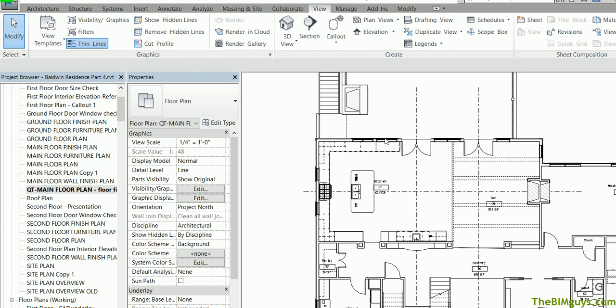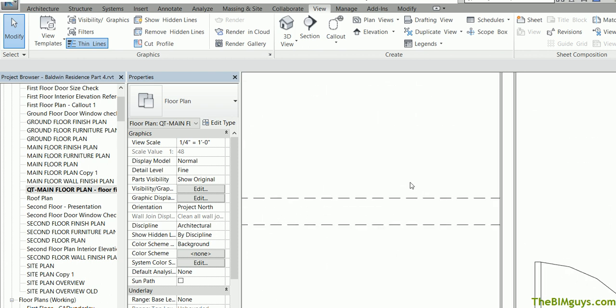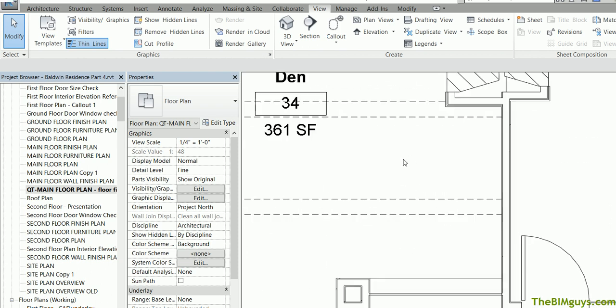Now the quantity takeoff is based off of the model, so the model has to be built correctly. If I zoom in close here, you'll notice that this wall does have two layers of gyp on it. Other walls may not have any gyp at all.